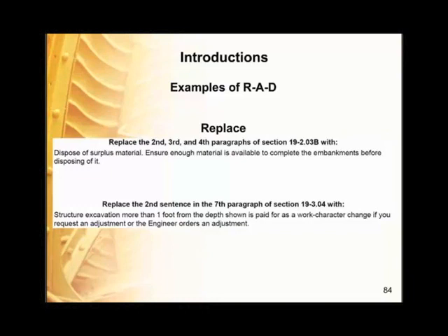You can either replace a standard specification section, the entire section, which you would see as a reserve section. You can replace a paragraph within a section. You can replace a range of paragraphs. You can replace a sentence. You can replace a word or a phrase, a short phrase or descriptive clause. And you can even replace an item in a list, or you can replace an item that's within a table.